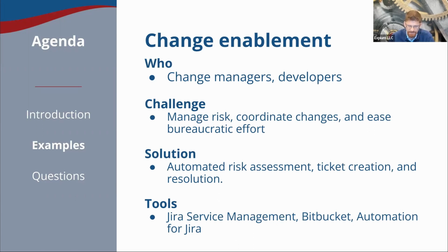The solution is to use a change ticketing system that does automated risk assessment, automated ticket creation on certain types of deployments, and automated resolution where possible. We really want to automate our risk assessment. We really want to automate our change request creation by connecting our change management system to our code repo. We want to automate the approvals of low-risk changes. We want to track and gate deployments via our CI/CD pipeline and make them visible in our ticketing tool. Basically, we want to do as little manual work as possible.